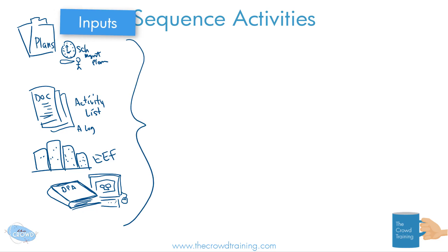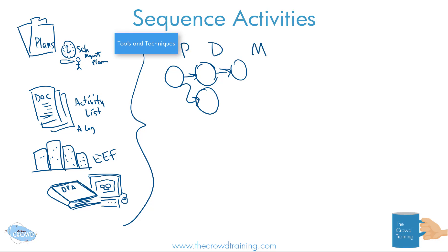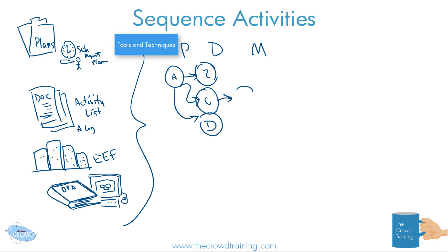Now let's get into the tools and techniques. There is one main method: the Precedence Diagramming Method, or PDM. The idea is that one activity precedes another, things can happen concurrently, and so on. You put your activities on the diagram — I'll just use some letters here — and then figure out the order: D has to go at the same time as C, C feeds into F, and we need activity B before A. That's essentially what's happening in the precedence diagramming method.